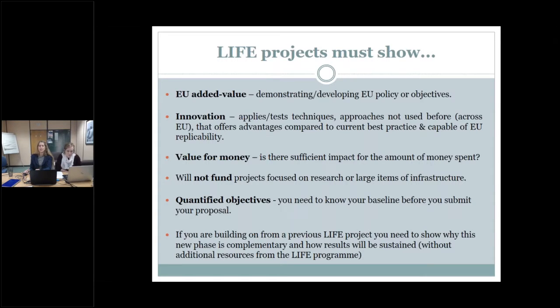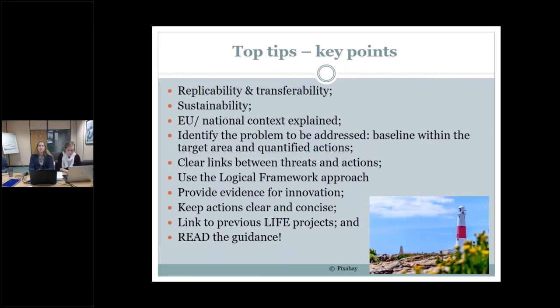You need to quantify your objectives. You need to know your baseline before you submit your proposal. I've said this also many times throughout the talk. And if you're building on from a previous LIFE project, you need to show how this new phase is complementary and how results will be sustained, because LIFE won't fund a project twice.